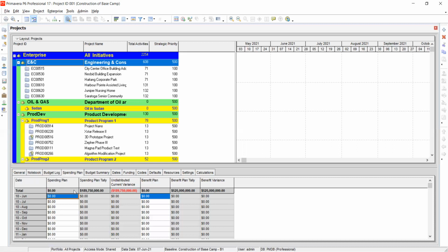So assigning them according to months may be harder than you getting the money, then saying, I've received 1 million. Let me give 20,000 to project A. Let me give 30,000 to project B. Let me give 30,000 to project C. So when you go to project now, you can distribute either to different work breakdown structure levels or even monthly. With that one, it is easier for you to track than when you do monthly on the EPS.